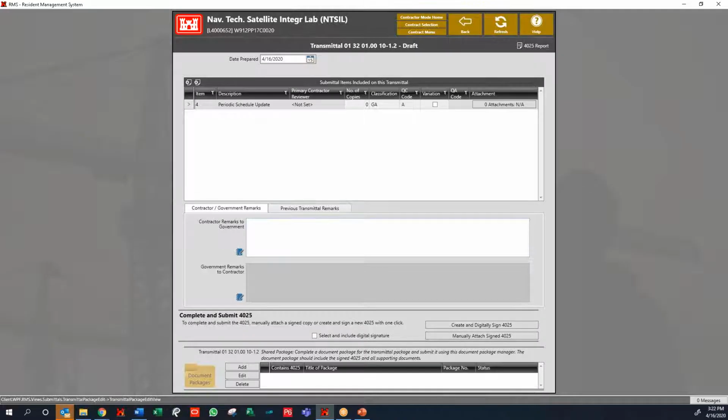Typical documentation is we're going to have some sort of bandit view schedule, which is usually your whole thing. Usually a continuous flow schedule, also known as waterfall. They usually want the typical reports of activity earnings by CLIN, activities report, earned value report, cash flow, logic, and I'm sure I'm missing one.